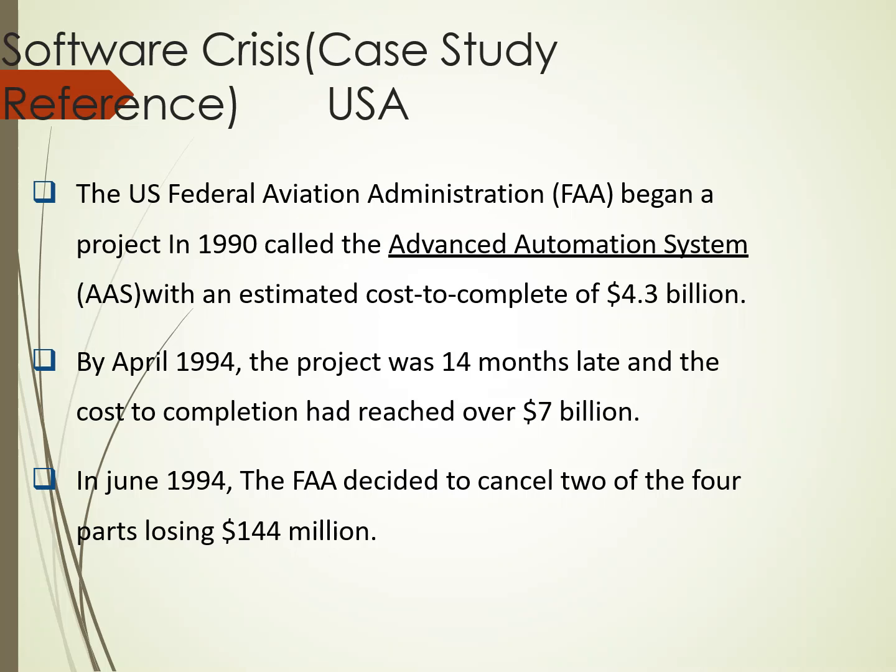The cost increased due to the delay and lost effort, and there was no requirements gathering before the project started. That was the main reason.